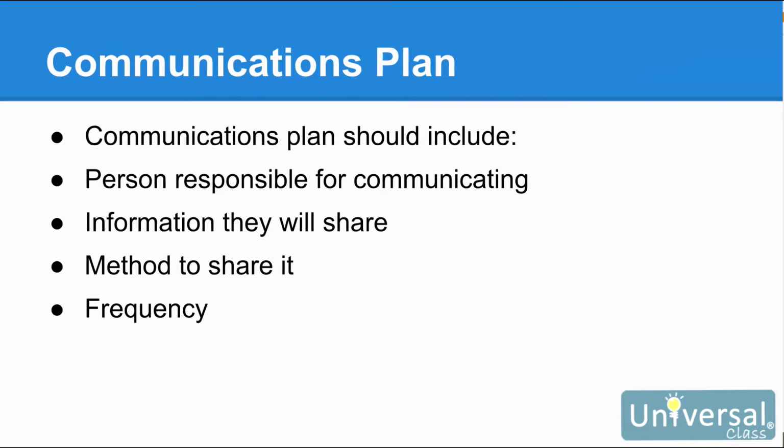The communications plan should include the person responsible for communicating information to you, the information they will need to share with you, the method they will use to share, such as email, report, or meeting, and the frequency at which they will share the information, daily, weekly, bi-weekly, and so on.